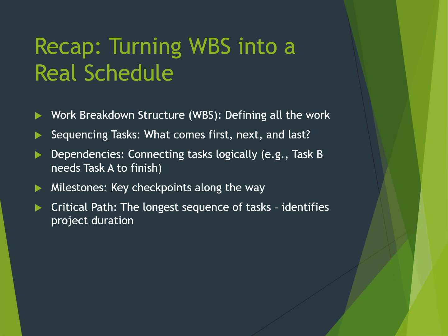In our last session, we took your work breakdown structure, which is essentially a detailed map of all the work your project entails, and we turned it into a dynamic, time-based schedule. This involved several crucial steps. First, sequencing tasks, figuring out the logical order of operations, what has to happen before something else can start. Then we established dependencies, which are those crucial links between tasks. For example, you can't install the software until the hardware is set up.